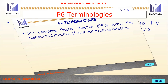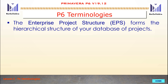The EPS, or Enterprise Project Structure, forms the hierarchical structure of the database of the project. For example, you have a project in Housing, a project in Land Development, a project in Bridge, and a project in Power Plant. We will set up this one in the EPS, the Enterprise Project Structure.